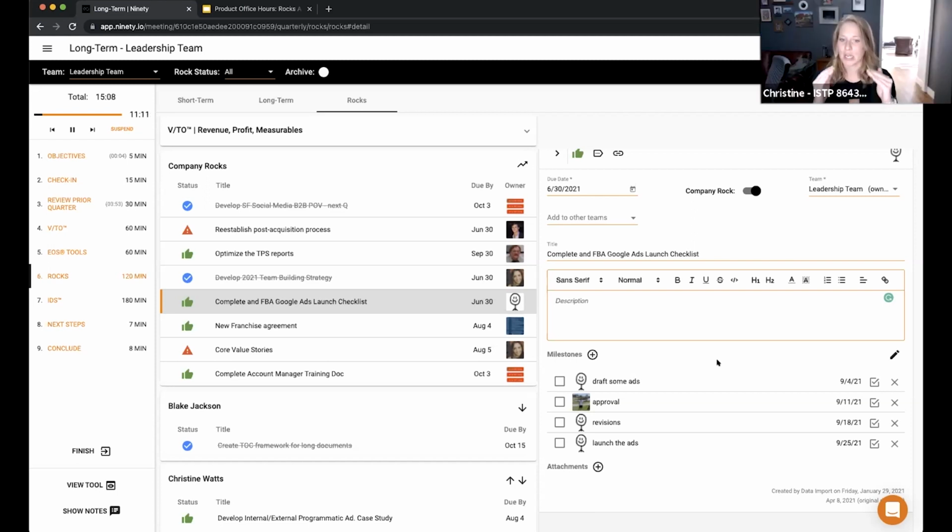Exactly. And I think if you're setting up a milestone every single week, it's not like you need to have a deliverable every single week in project management terms. So don't feel like I have to think of something or make something up that's going to make sense as a deliverable every single week. It can just be progression steps along the process. So getting revisions back, I don't know if that's really a deliverable. It's just something we know we've got to get done. Let's put a due date on it so that we're being held accountable and know if we're getting too far off track with it.